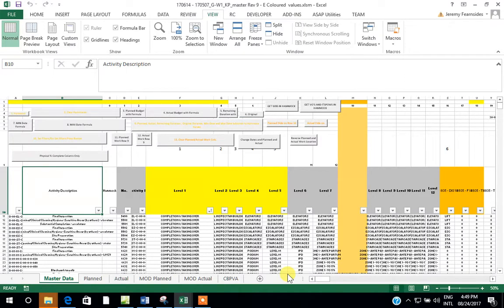To do this, you can't really do it at a detail level because it just will lose any substance. So for this demonstration, I'm going to show you an extreme summary level. And so what we can do is we can show things, we can hammock this to a summary level. In this case, it is up to 5 levels.